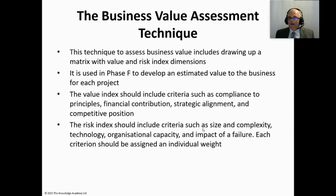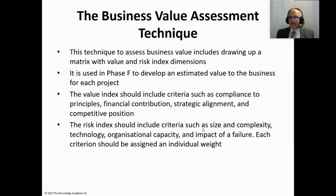The business value assessment technique allows us to look at the relative value and risk of our major projects and then use that information to determine which project to do first. It involves creating a grid or matrix with risk along one axis and value up the other, then plotting projects accordingly to give an idea of sequence and implementation. It's just one technique for determining sequence — factors such as dependencies will often override it — and it would typically only be used at a strategic level.